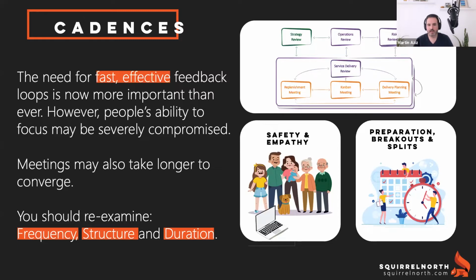Other things with regards to frequency, Fernando talked about this when he had the slide talking about your roadmap and upstream Kanban. Something like your replenishment frequency: if you have been doing that fairly infrequently in the past, it suggests that things are fairly stable and the things that you are committing to are good options for quite some time.